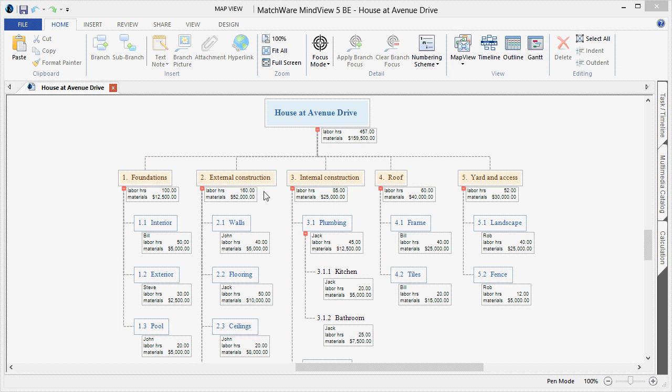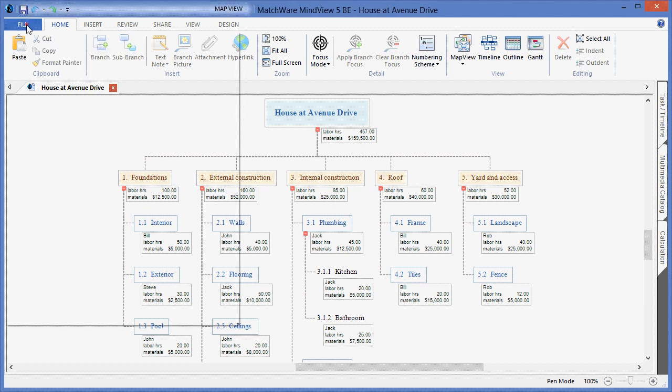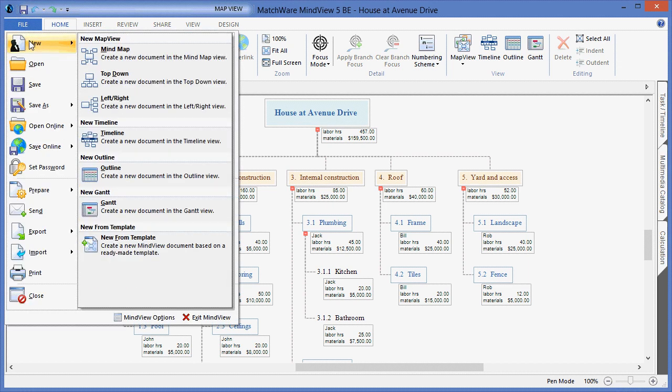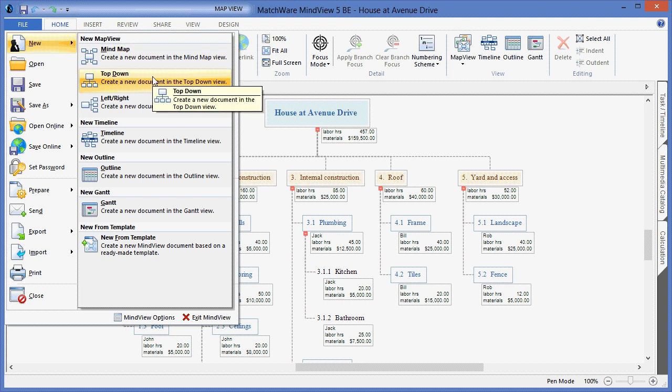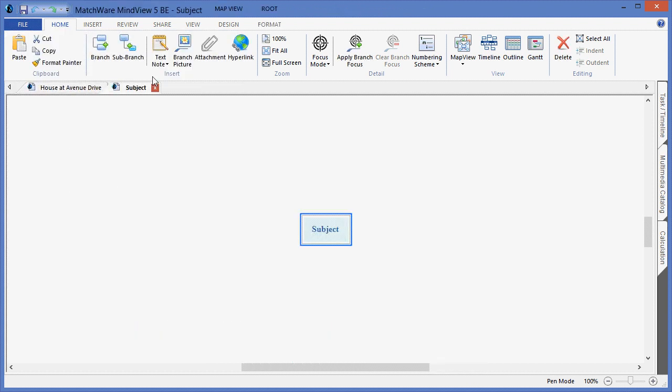To begin creating a WBS in MindView, simply choose File, New, and choose the top-down view. The subject or central topic of your WBS should be the name of your project. In this case, we will type House at Avenue Drive.